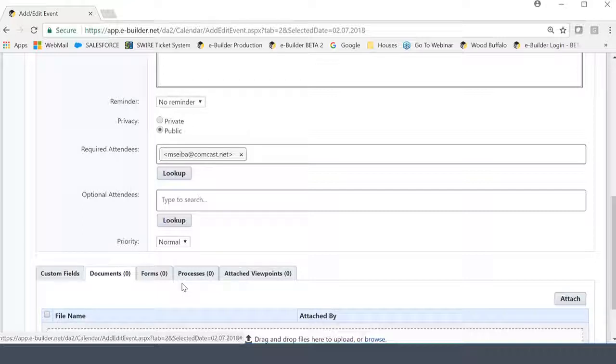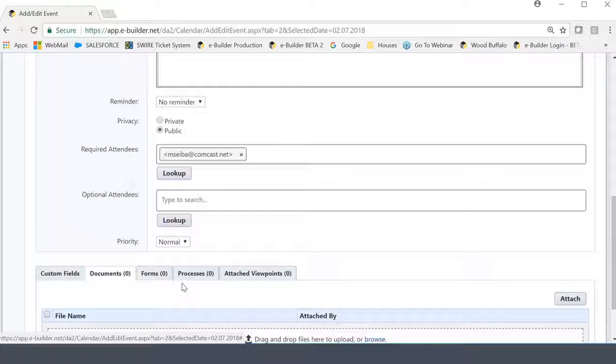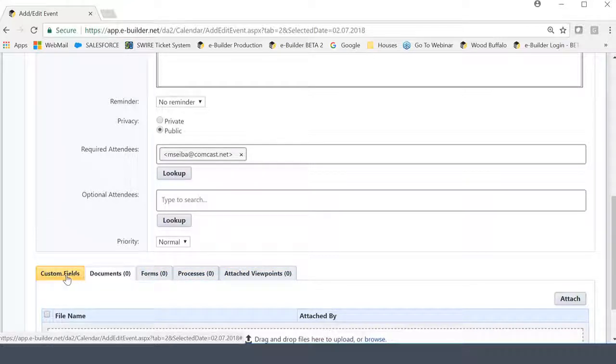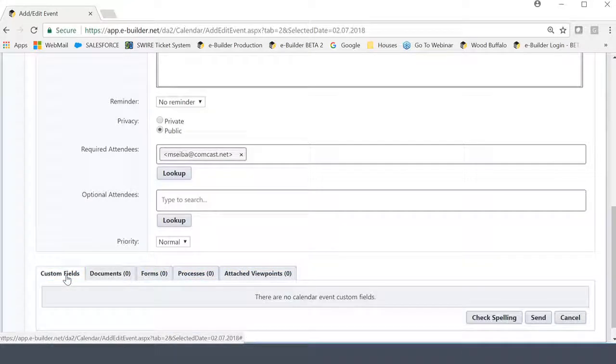The next two tabs have to do with both of our workflow management modules. And if there's any kind of an instance like an RFI or a change order approval process or anything like that that we typically have in eBuilder, you can attach that as well as referential documentation. And then the attach viewpoints are related to our BIM feature. So if you're currently not using business information modeling, it's kind of an irrelevant tab to our review. But if let's say you want to attach a viewpoint from your BIM model and relate it to the topic of discussion at this meeting, you can.